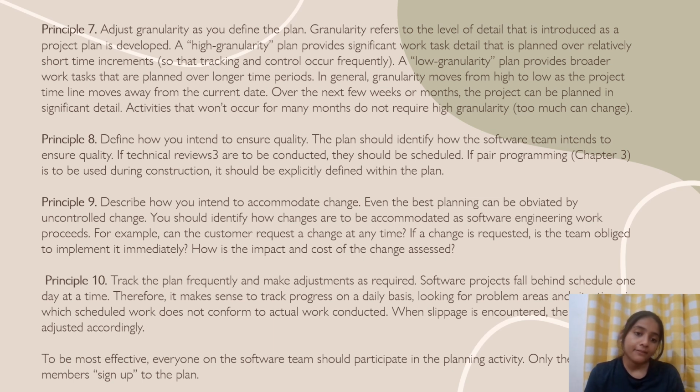Principle 9: define how you intend to accommodate change. Even the best planning can be obviated by uncontrolled change. You should identify how changes are to be accommodated as software engineering work proceeds. For example, can the customer request a change at any time? If a change is requested, is the team obliged to implement it immediately? What are the impacts and costs of the change?